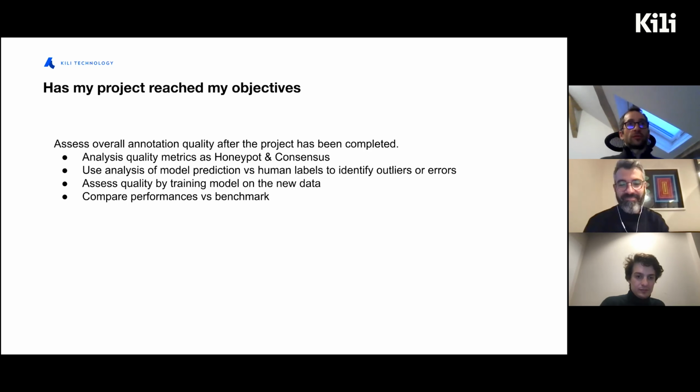Maybe Mathieu remarked on this. I would say that from my own perspective, on many projects we don't have a very precise metric that we compute, but it's more like is the client happy, does it look good. It can be interesting to have a real metric, but it usually takes a lot of time. For example, if you want to compute the metric for the review, we had this example on a project, it was nearly taking the reviewer twice or three times as much time than just reviewing. So you have to take into account that computing an error matrix